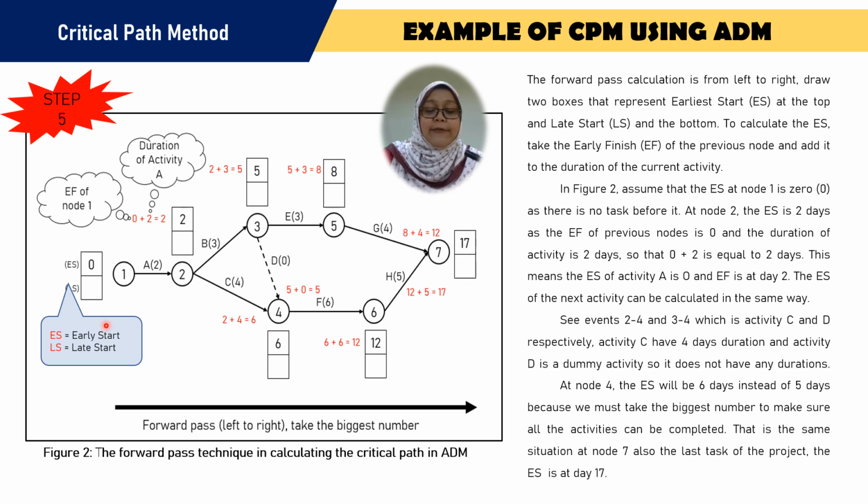We have to bear in mind when doing the forward pass, if there are two different numbers from previous activities, we have to choose the greater number.